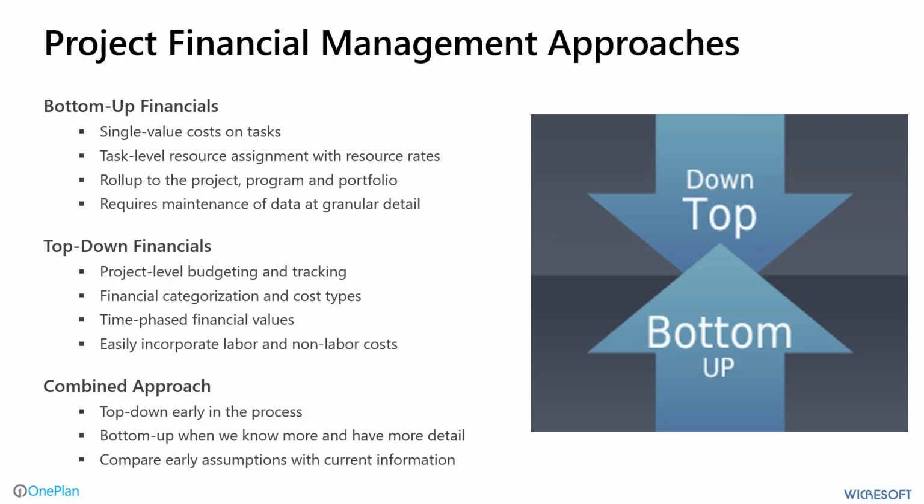And then these elements could roll up to a project level or a program level or portfolio level from that granular detail. The challenge with this approach is that it requires maintenance of data at a very granular level of detail, and people need to do that consistently at that level in order to maintain it from the bottom up.